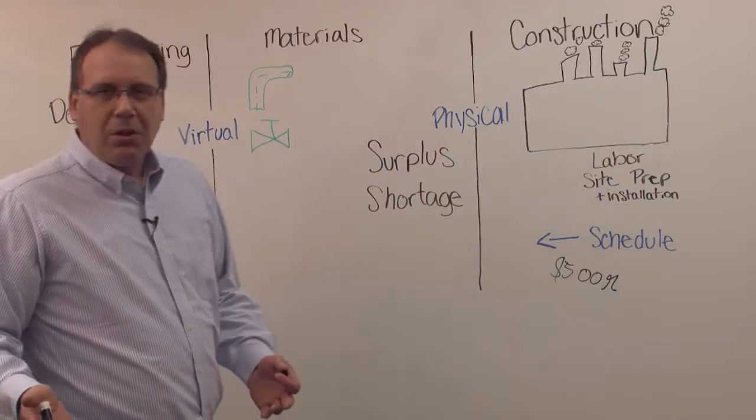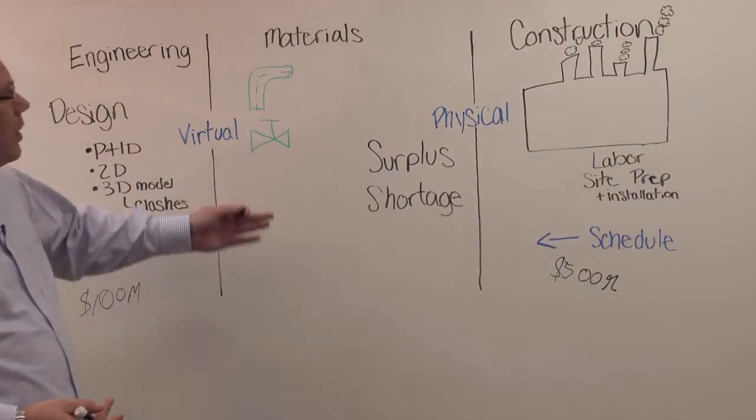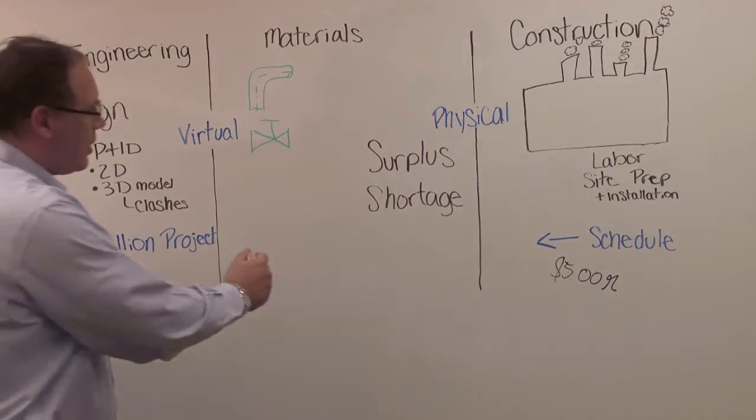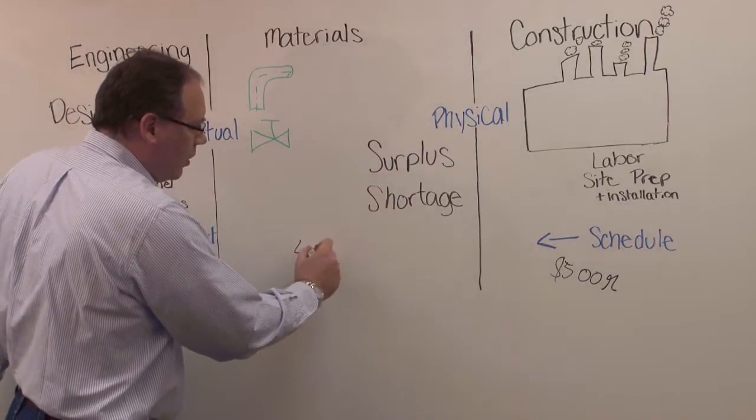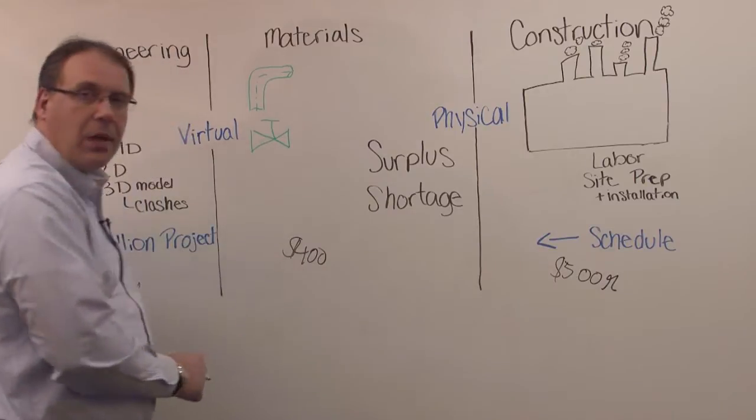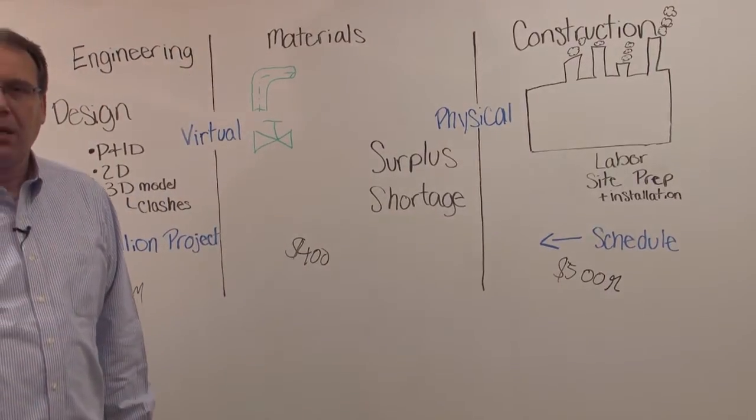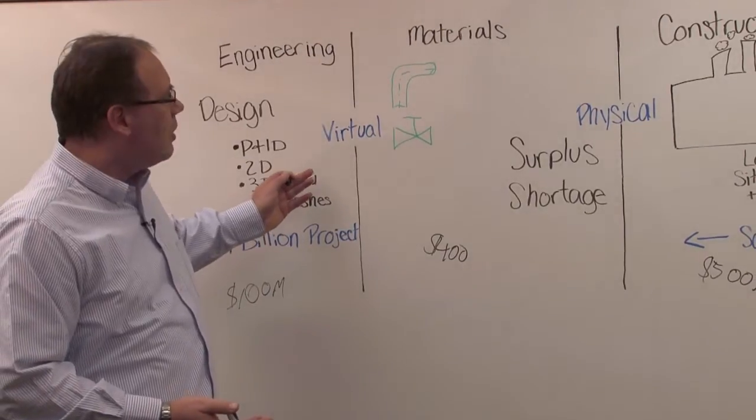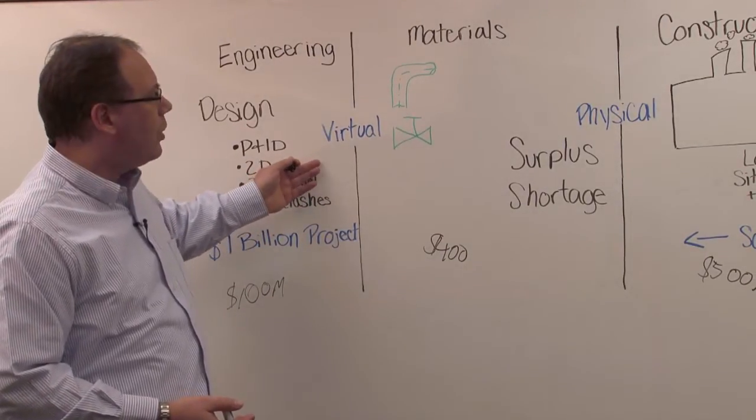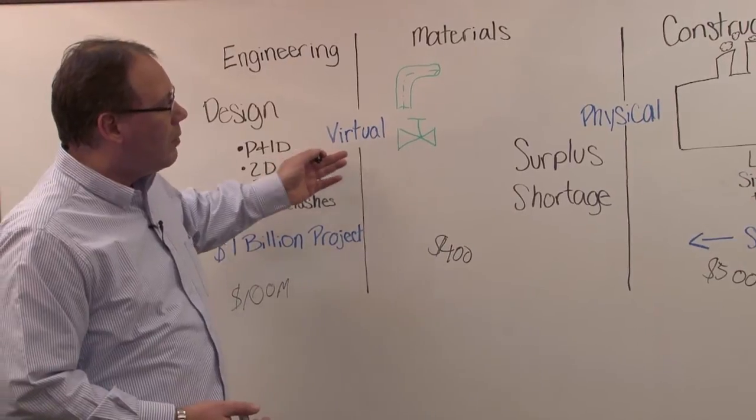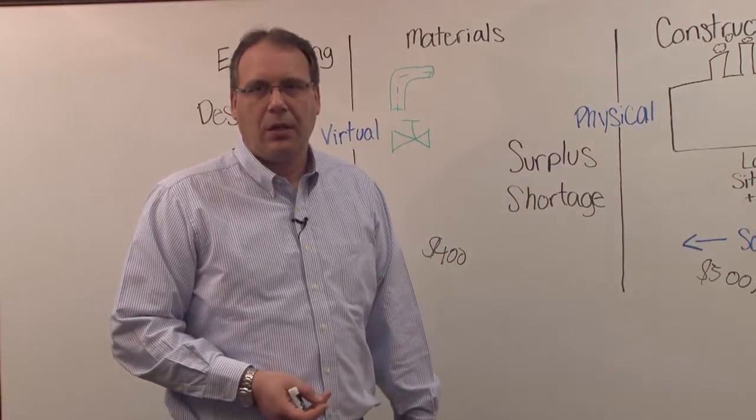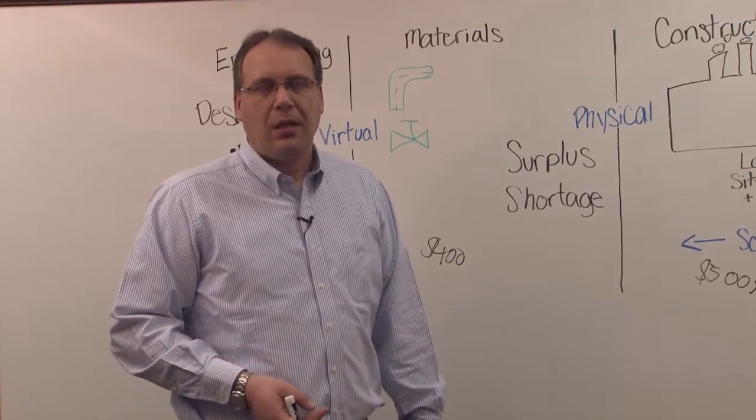Materials management is really important because you will spend, in this example, 400 million in materials management. So you need to buy basically all the materials that's needed, as defined in the drawings and the 3D model, buy them and then ship them to the construction site so you can start the installation.